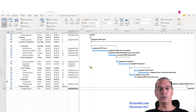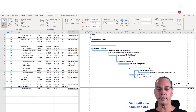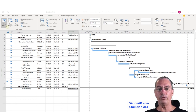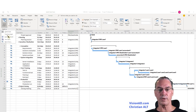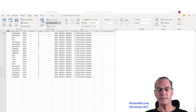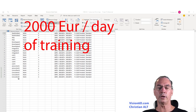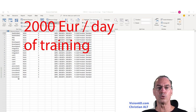With this, we've added what are called work resources to the project — meaning people who will work in the project. Now there is one thing we haven't done: during the training we need a trainer. Looking at our resources, we see we have a consultant. But I've also said that in the end we are going to pay a certain amount per day for the training — 2000 per day.